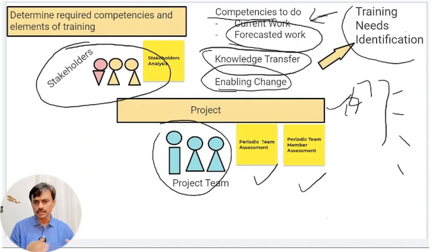their activities. Project teams will have a need for training throughout because the skills are dynamic, and people keep coming in and going out of the project space. So as a project manager, we need to identify the required competencies and the gaps on a periodic basis so that we can recommend the right training. So that's the first subtask of your training task.